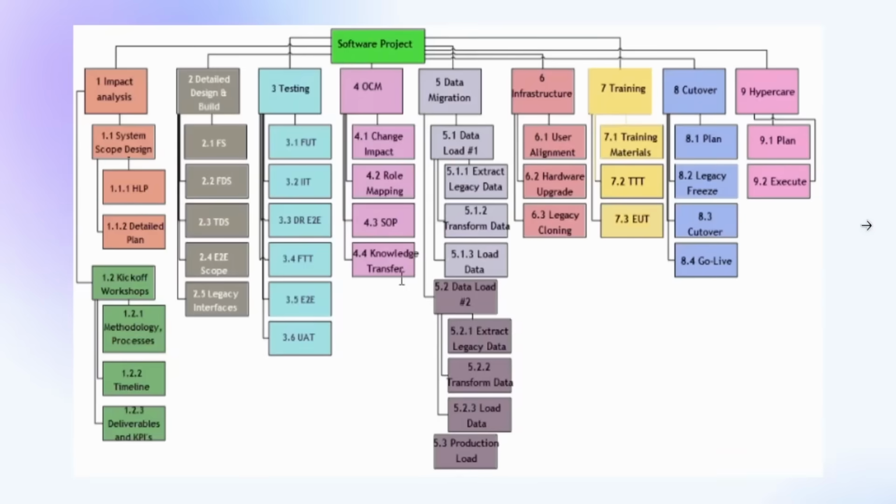So what we're going to do next is take a look here at a sample work breakdown structure for a project. So here at the first level, you have kind of like the work streams or the phases. It's up to you. Here they have the particular work streams: training, cutover, testing, impact analysis. You can have instead, if you want, requirements tracks, quality assurance tracks, testing, it's up to you. But the concept here is that you have your major tracks listed here first.